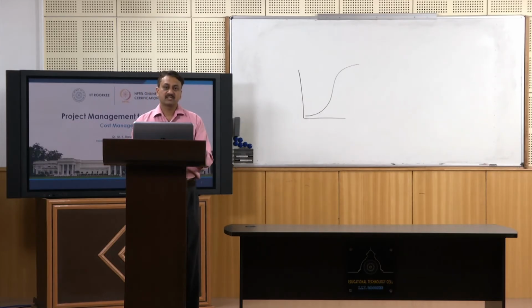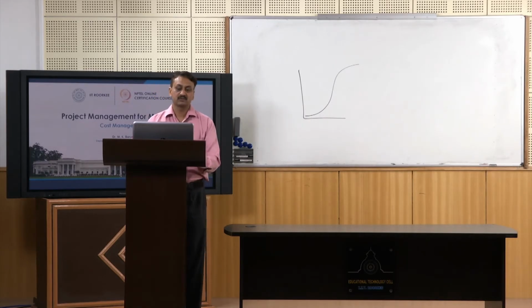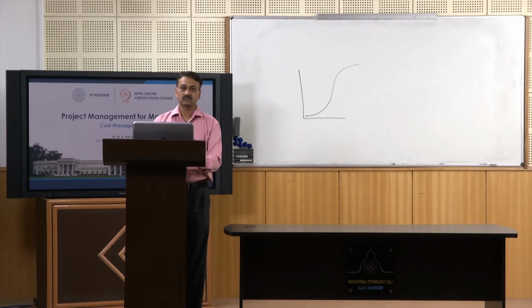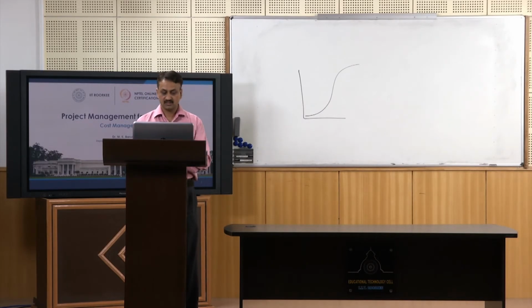As you are aware, in the previous session we were discussing ITTO of cost estimation and cost budgeting, and now we will talk about cost control. We have seen different inputs for cost control, and let us look at tools and techniques. There is something called the cost change control system, a procedure by which you can change the cost baseline, right. So you need to have several documents and approvals done to get the cost baseline changed.